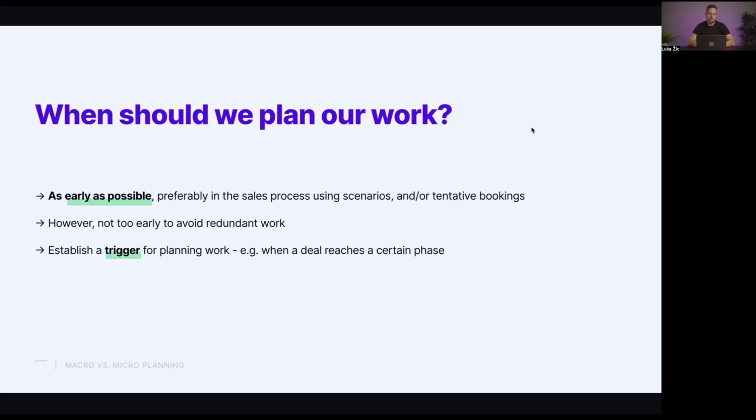You want to avoid situations, going back to my previous example, where you have just won a big new job that you have to finalize in the next 6 months. And only then, once it has been signed off, do you realize, hey, we don't actually have the manpower to do this. We don't have the people to do this. We have to either delay this by 2 months, or we have to hire external contractors, expensive external contractors, which will then make our margins significantly lower than we had anticipated, right? So we want to plan it as early as possible, preferably while we are still in the sales process.